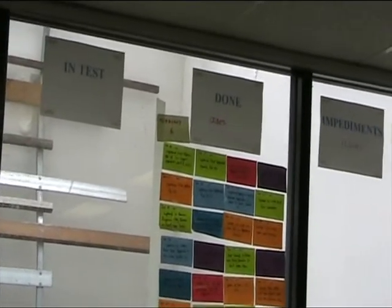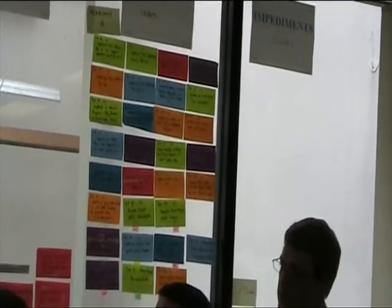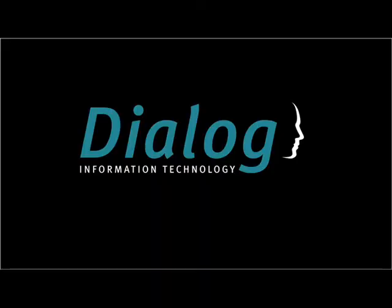They've just finished a big batch of work, so they're sitting there in done. So the definition of done is that it has been developed, peer reviewed, tested, and the testers have approved it according to what we understand should be done.